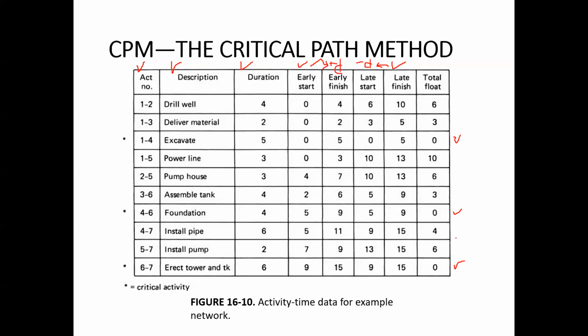While using a bar graph, for example, we can see the scheduled data, and alongside the scheduled data, we can see the actual data too, what real construction process is going on. Yes, we can see it, but if only a bar graph is used, then it is very difficult to perform the network calculations.